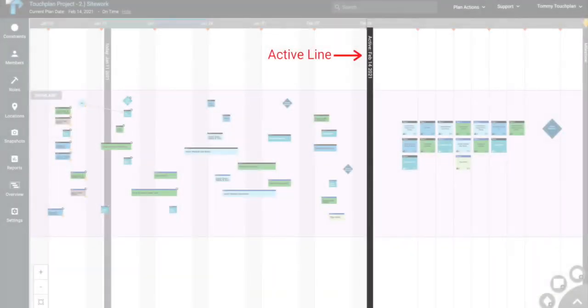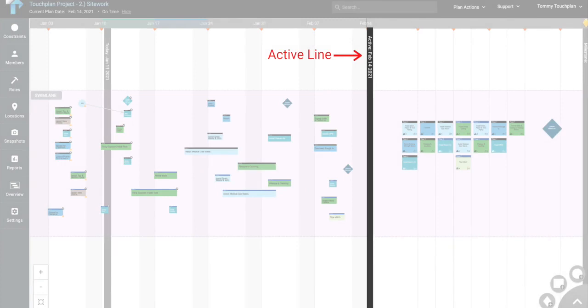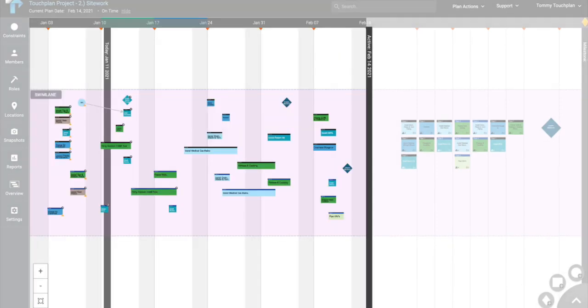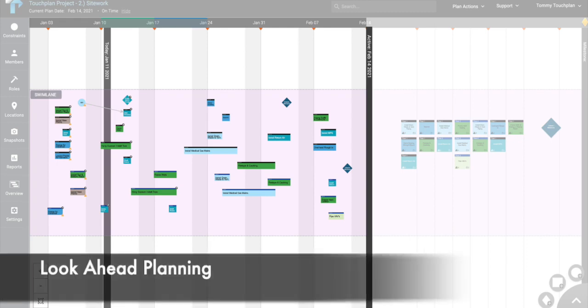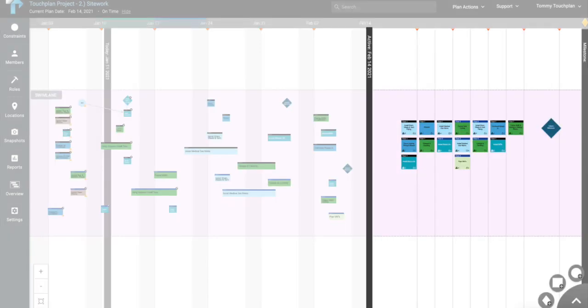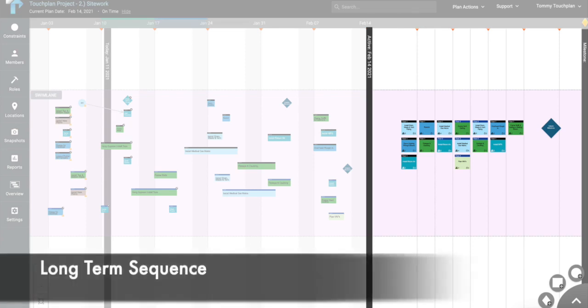You'll notice in our phase plan that we have an active line running top to bottom on the right-hand side of my screen. The active line determines how far out into the future your scheduling space goes. As you can see, there's a scheduling timeline to the left-hand side of the active line, which represents our short-term look-ahead planning. To the right-hand side of our active line is a blank-white planning board that allows teams to sequence long-term activities without dates.